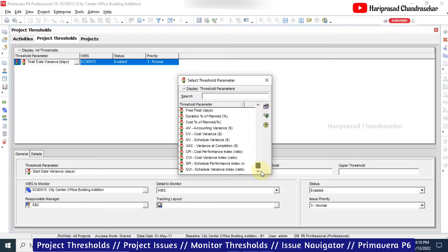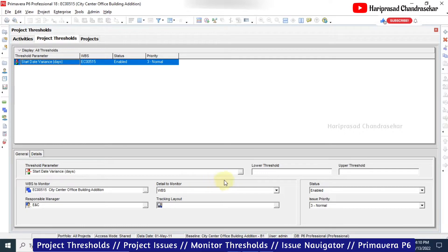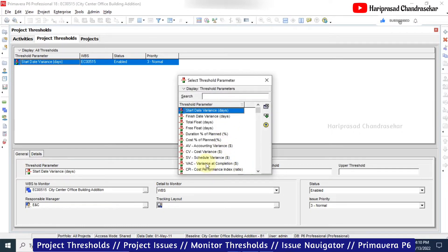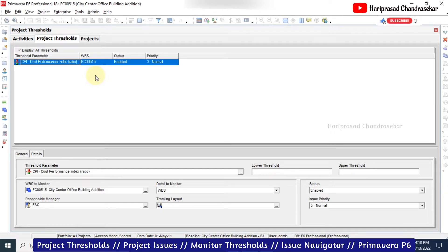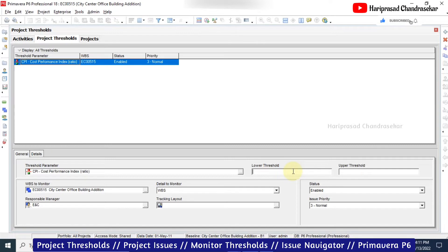You can click the Add button and select different threshold parameters - we have many parameters available. For example, I will continue with the Cost Performance Index (CPI), which everyone knows. CPI of 1 means the project is going as per what we planned - actuals match the plan. Less than 1 means we are going out of budget, which is not good. More than 1 means actual cost is less than planned, which is very good for the project.